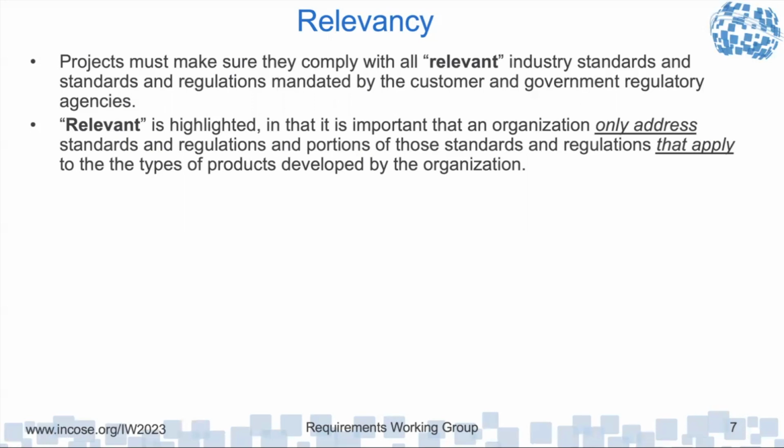I'll get into it a little bit later, but I've seen so many projects where, in a document-based world, the requirements in the front have a section called applicable documents and reference documents. That list can grow to be quite large, and some projects just copy and paste that list from one project to another without ever reading or assessing whether any of those are actually relevant to the system of interest. And these are put into their technical requirements.